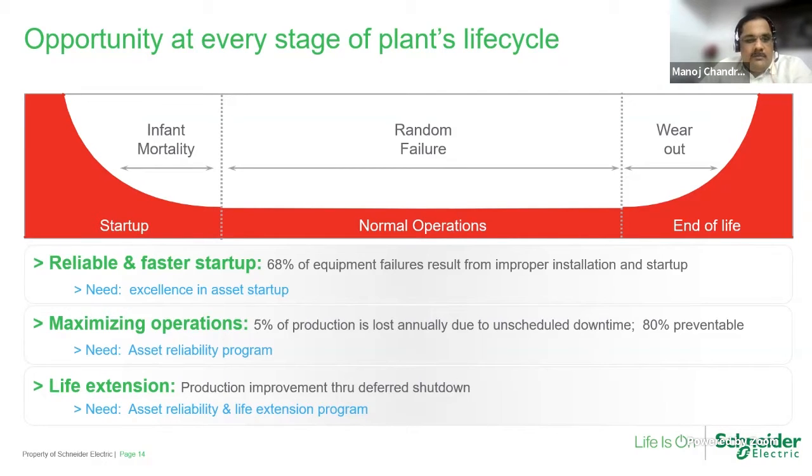There are statistics which say that if you are doing a reliable startup, a very tightly controlled startup, you can avoid up to 68% of equipment failures. Not only that, usually the startup is a very manual, very labor intensive affair.